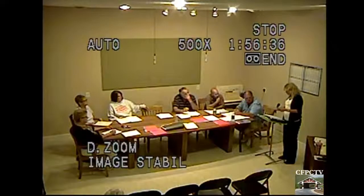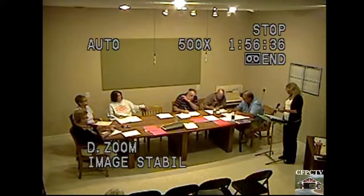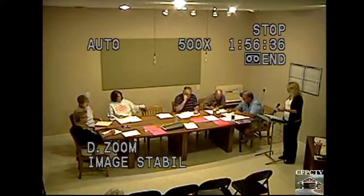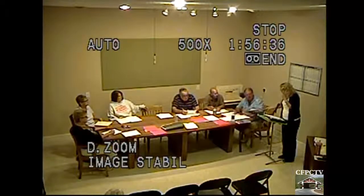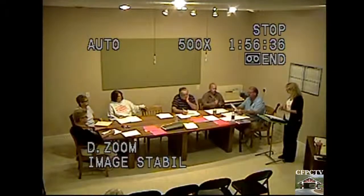So the total change order is $110,183 even, and that includes those two items plus the planing, the tack coat, the intermediate asphalt, and the surface asphalt addition for Shady Lane from the cul-de-sac to De Frederico, and then Lincoln Lane, or Lincoln Street, I forget what it's called, from the cul-de-sac to Wren, where we stopped at Wren. So if somebody wants to make a motion to accept that change order, please.